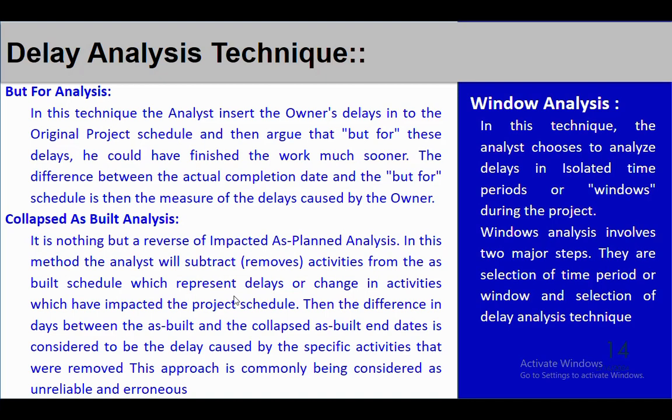Basically, window analysis is used when the project duration is very big, like a 4-year project. In such projects, to analyze the delays of all the delay events in one go is very difficult and challenging. So instead of analyzing the whole project delay, you can divide it into windows, and then you can analyze the delay of each window, and while summing up the delay of each window, it will give you the total delay of the project.